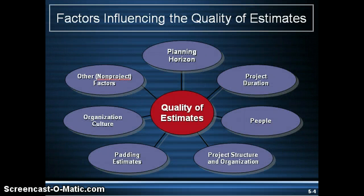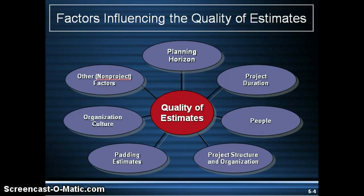There are different factors influencing the quality of estimates. First is the planning horizon, which is basically the time before the project will start. If a project is not due to start for another year, the quality of the estimate may be low because of different things like labor rates, material costs, availability of resources, and technology available. So the quality of the estimate will be affected based on the length of time before the project even begins.